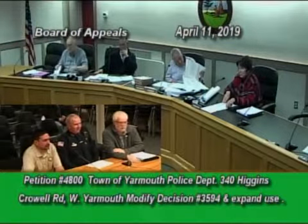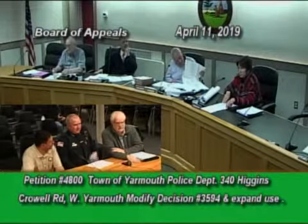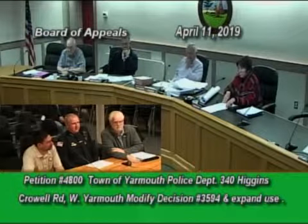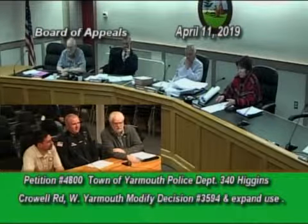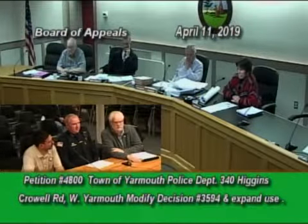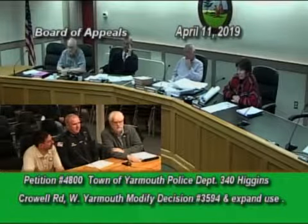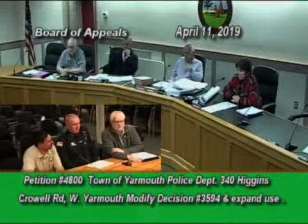Right. These wall panels here, that's a brand-new product. I just got 2 test panels delivered to my house, and I'm going to be bringing them down to the police station next week so they can look at them and shoot their simunition rounds, the little paint pellets they use, to make sure they can't damage them before we make the decision. But right now, I'm proposing that we provide over 600 linear feet of 7-foot-high walls for this training facility because it's a 2-story building. It's 6,400 square feet, so we can put a lot of walls in there. And right now, they're coming in around $75,000 for that wall system.